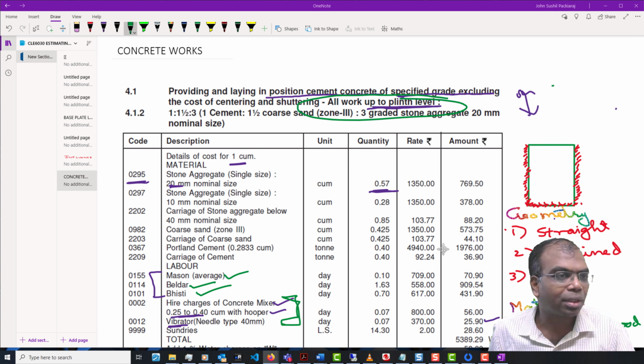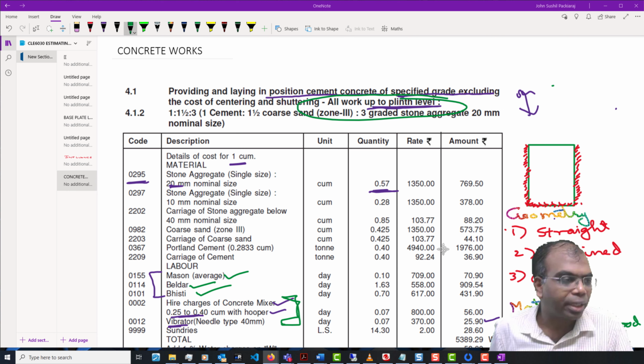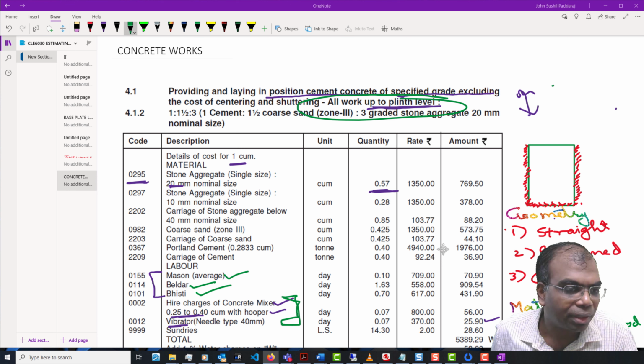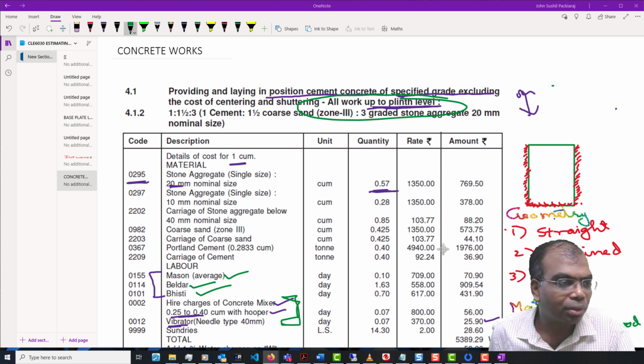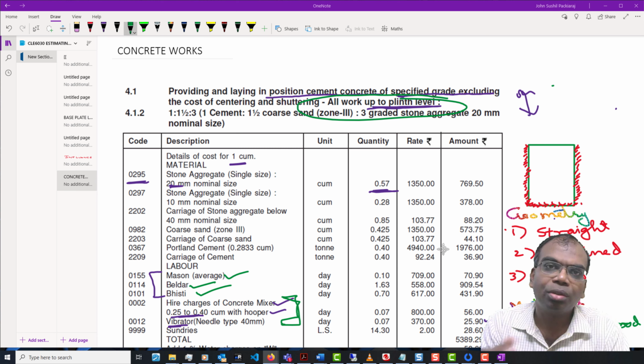On the other hand, suppose it's a contract where the people who are taking your services do not have an option to insist that it has to be just like this, and they are not going to worry too much about how the work is going to be done. In such a case, you may hire it because it is going to be much cheaper. So the decision is based on the type of work. Government guidelines will not give you the cost at which you are going to get it.